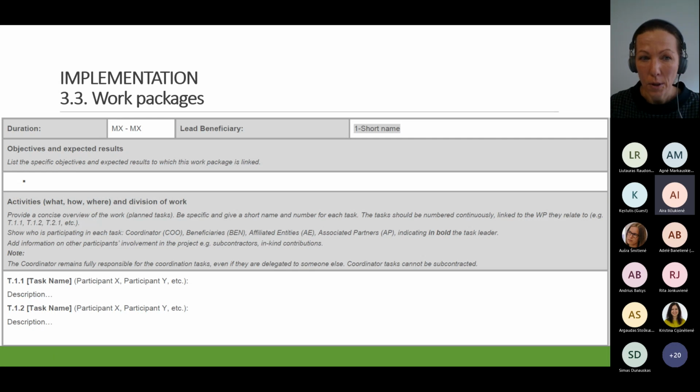If the project is smaller and simpler, I think you would just be fine with task 1, task 1.1, task 1.2, and so on under work packages. They recommend not to have too many work packages. I don't know what's too many. I'd probably say don't go above 7 or 8, or 6. They don't give you a specific number, but they say don't have too many work packages. But organize them, I think, by the logic of the project.